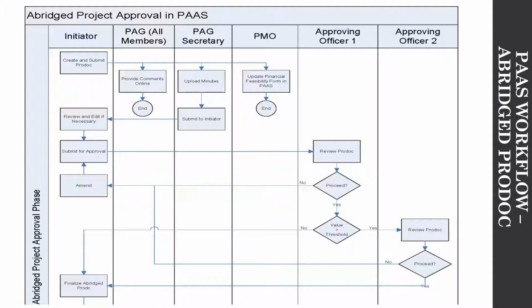So when the project goes back after the PAG meeting to the project manager, and he or she clicks submit, it would first stop at the inbox of the relevant branch coordinator. He or she reviews and then clicks off now to the program divisional director.